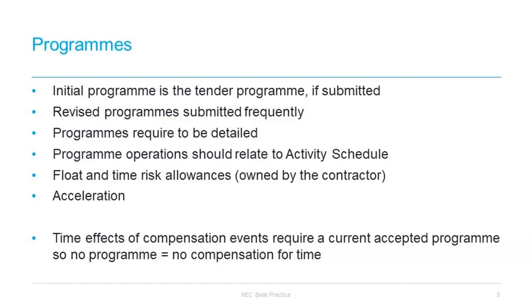If the programme is included within the contract data, then it is automatically the accepted programme. If the programme is submitted afterwards, or for any revisals to the programme, it only becomes the accepted programme after being accepted by the employer. The project manager has 2 weeks to accept a submitted programme or notify the contractor of his reasons for not accepting it.